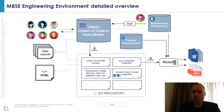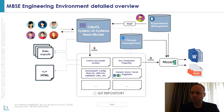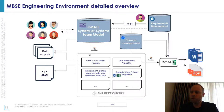Change management is really key in the current phase of the project — everything needs to be driven by it, and we use JIRA for that. Inside DOORS, we have DXL scripts in place that ensure when an engineer changes data inside DOORS, they provide the related change key, so we can always see which changes are related to which JIRA tickets. We have the same in place for our model, based on the Myelin solution, so when we look at the change history of the model, we always see which JIRA ticket keys relate to which changes in the model.